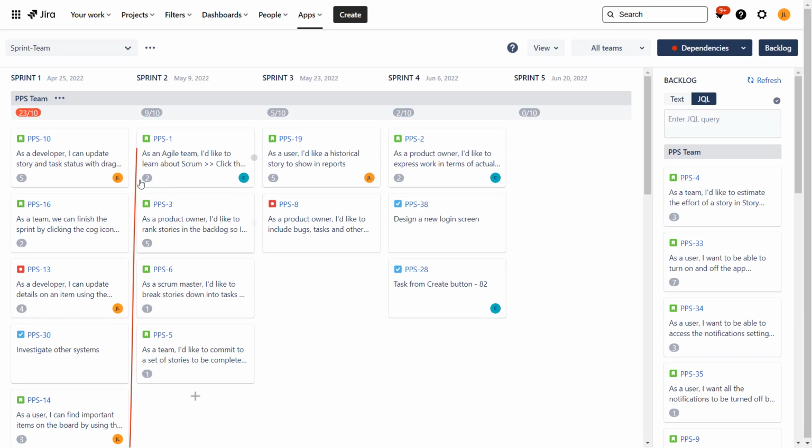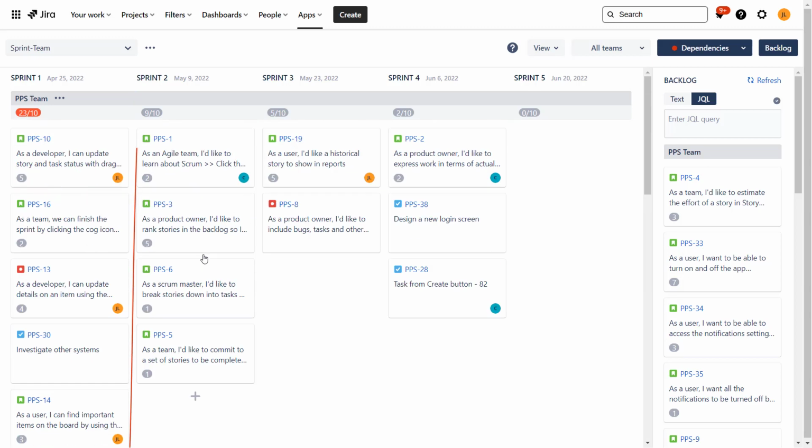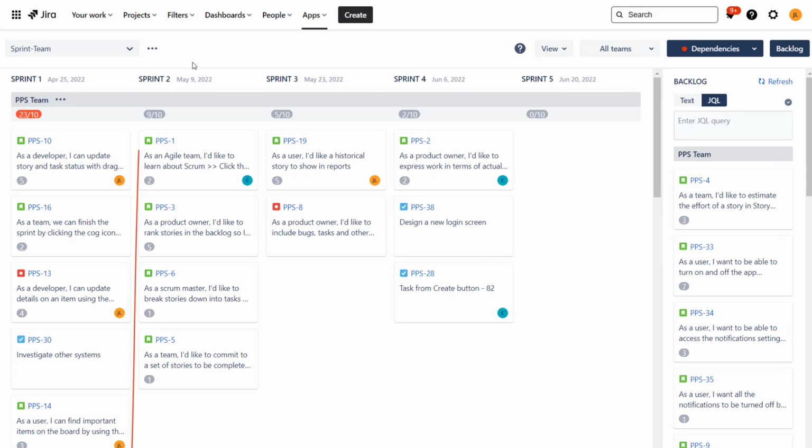Yeah, we can set this value separately for each team. The thing that I would like to see here, and that is not yet available, is to be able to set it separately for each particular sprint, because there are holiday seasons, for example, when part of the people takes time off and our velocity is sure to fall. That feature is not yet here, but I hope in future it will appear.